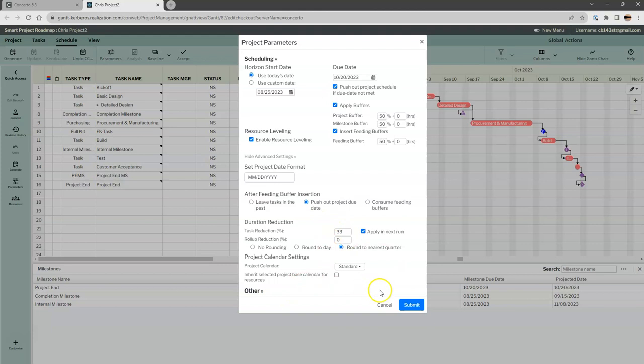So what this means is I'll have the overall chain length. I'm going to take 1/3 of that chain length. So reduce all the tasks by 1/3. So the chain length will now be 2/3 of the original value. I'll take that 1/3 that we reduced, place it at the end of the project. So there'll be 2/3 of task time, 1/3 of project buffer. That means the project buffer is 50% of the chain length. That's why we use 50% buffers.